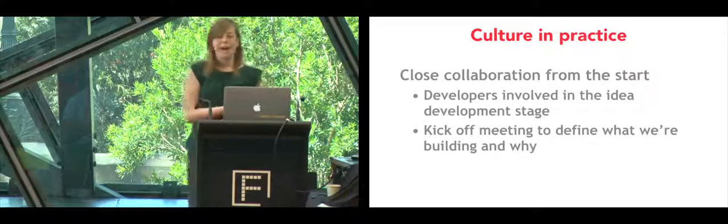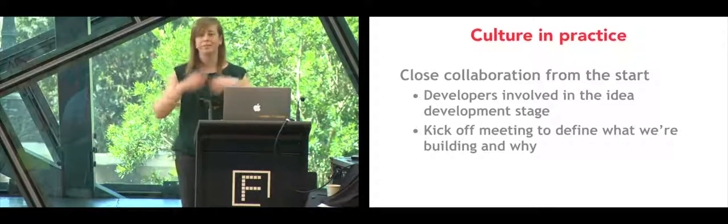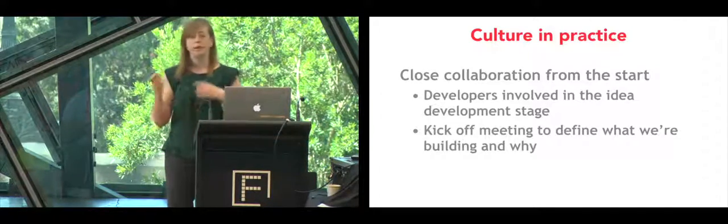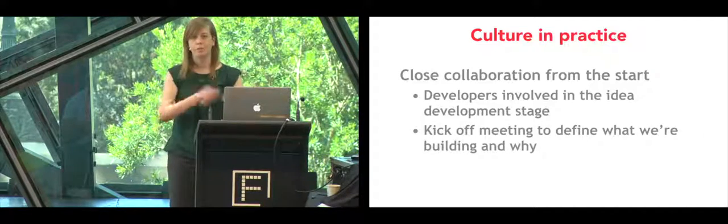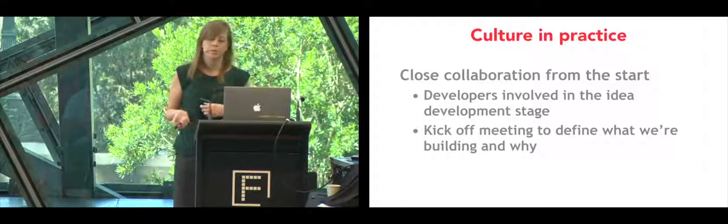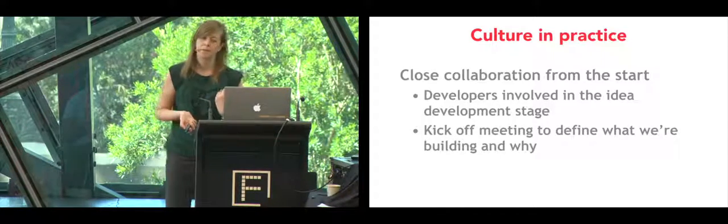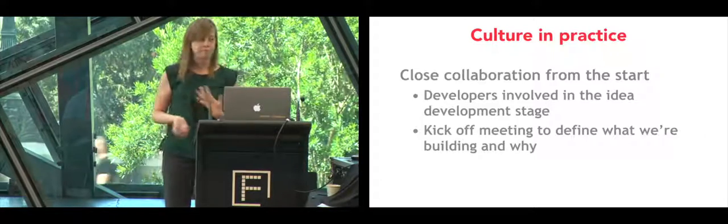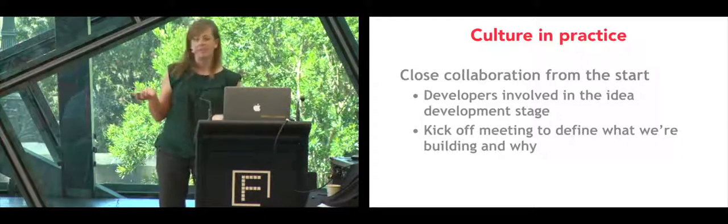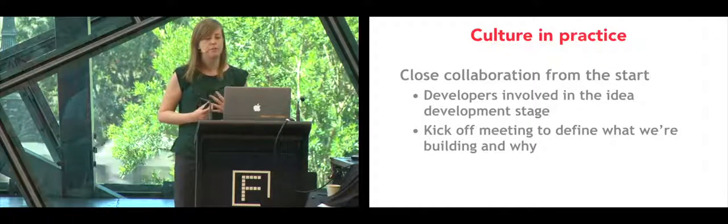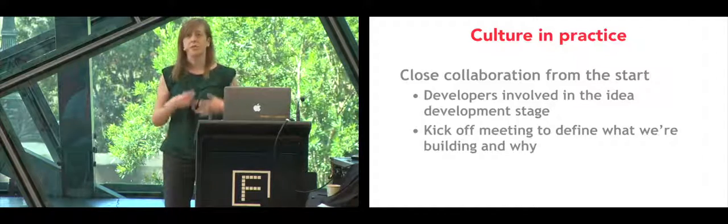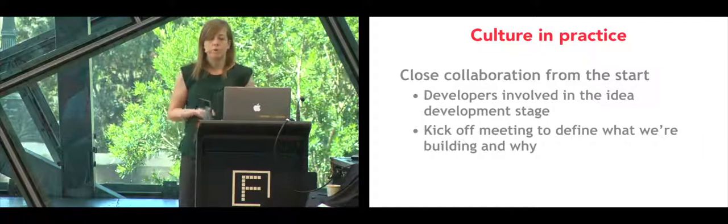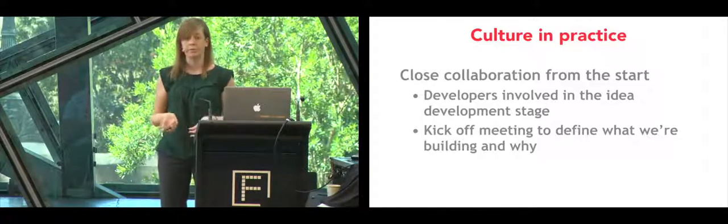We used to have features that were fully formed, delivered to developers. The product manager and the designer would think about it and define it after weeks of discussion and then tell the developer just build this. Now we try to bring developers much earlier in the idea development process so we can understand the context and give feedback early on. Features are defined during what we call kickoff meetings with developers, product managers, testers, and everyone that's involved, and that allows for everyone to raise questions and collaborate and define what it is that we're trying to build and understand why we're trying to build it.